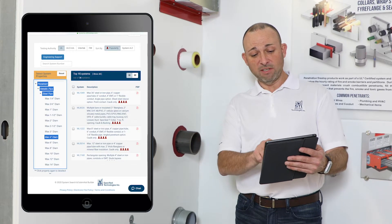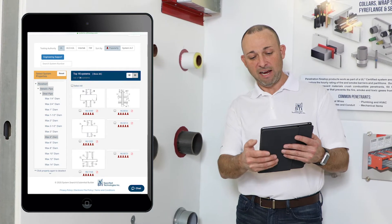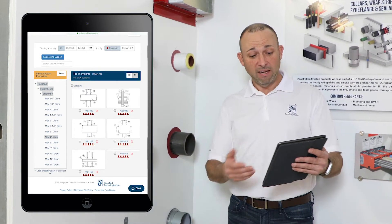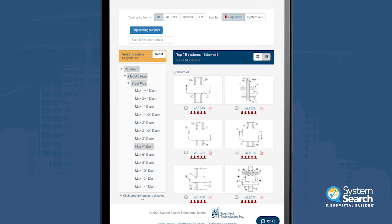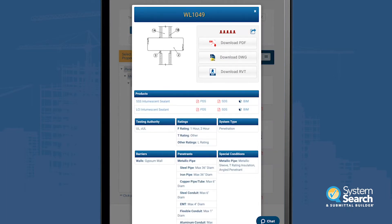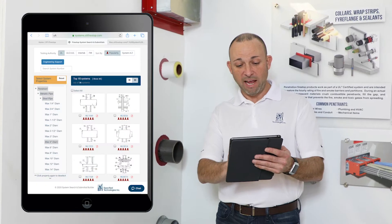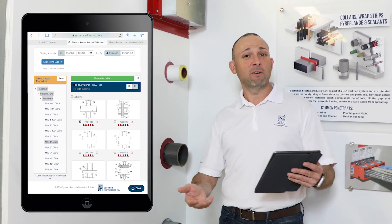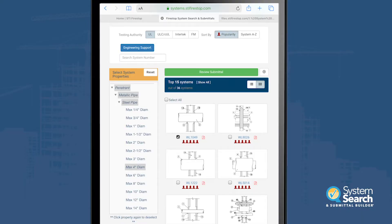We'll take a look here at the description. If we click this little tile, we'll see a picture of it and we'll see that steel pipe passing through a gypsum wall. So we'll take a look at WL 1049 — take a quick look at that PDF as it's opening up in a separate window. We can see that it has a one or a two hour option for this particular system, which is great because we can choose just the one system for both instances. We'll go back over to the app and choose that, and you'll see the review submittal already popped up — we've already started building our submittal.